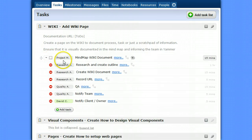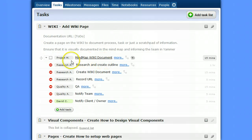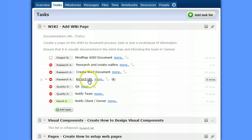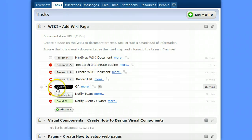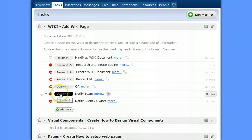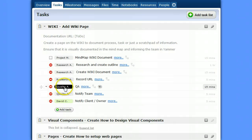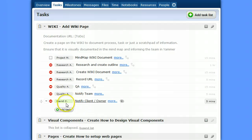So I've assigned project manager to the mind map wiki document. A research assistant actually does the work. The QA person will check the work and notify the team. Because when they're done, this person, the client, will automatically be notified. I don't have a client user created, so I've just put my own name in.